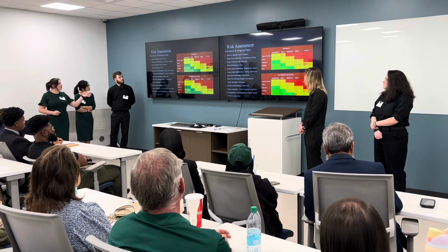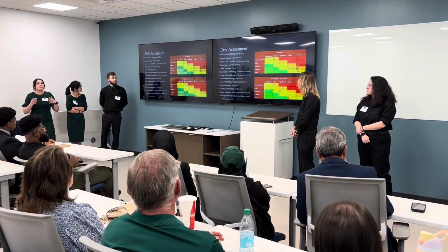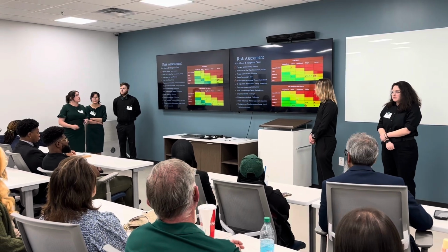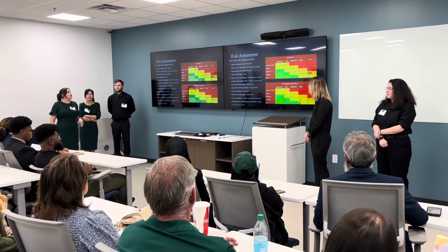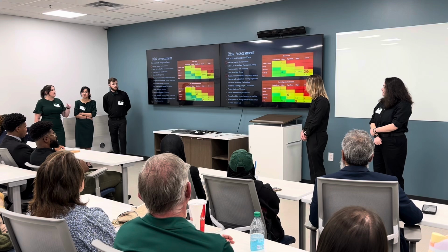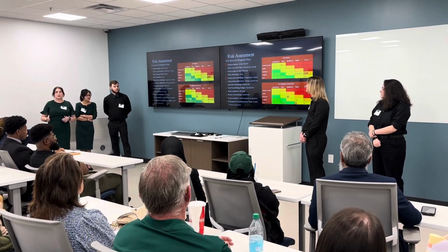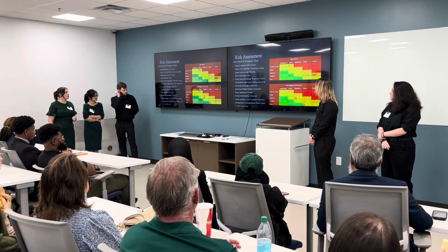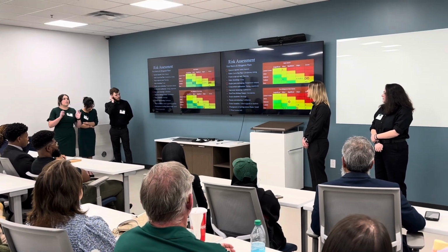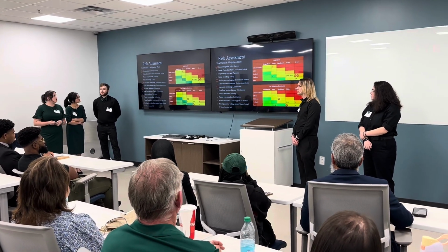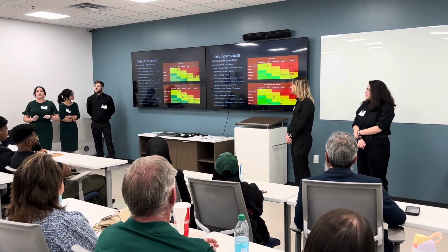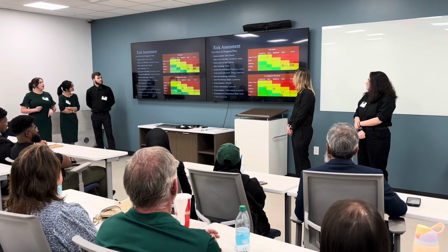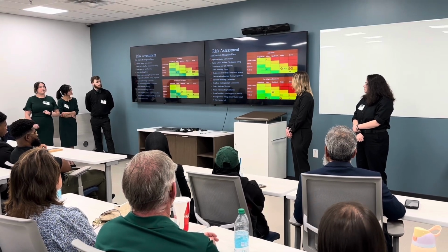Next is header press overheating. That's a major concern with safety as well, and also heat, fire can be an issue. So that was in severe and unlikely as well, and then that moved to significant and moderate with adding the temperature sensors and other parameters in place to mitigate that. The last one I'll talk about is inaccurate measuring. Our product needs to be very precise, so calibrating everything is very important for the success of the measuring. That started in major and unlikely, and now it is in minor and rare.